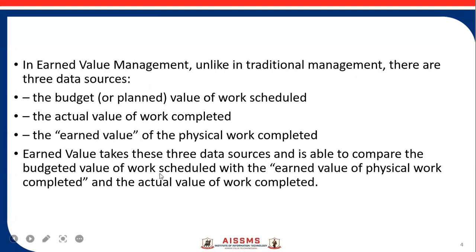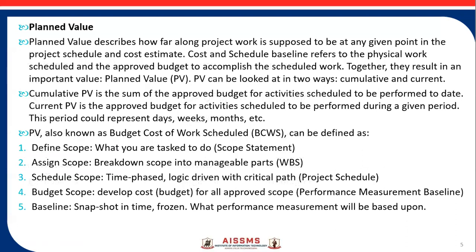The first one is planned value. Planned value basically describes how far along the project work is supposed to be at any given point in the project schedule and cost estimate. Cost and schedule baseline refers to the physical work scheduled and approved budget to accomplish the scheduled work. Together they result in an important value — the planned value. PV can be looked at in two ways: cumulative and current. Cumulative PV is the sum of approved budget for activities scheduled to be performed to date. Current PV is the approved budget for activities scheduled to be performed during a given period — days, weeks, months, or years. PV is also known as the budgeted cost of work scheduled.